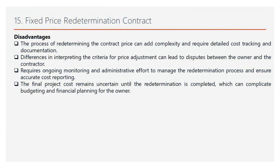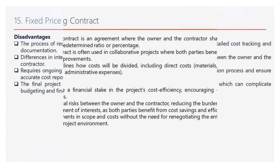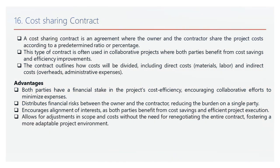Understanding these drawbacks can help you prepare better strategies for managing a fixed price redetermination contract. Let's now discuss the cost-sharing contract, an agreement designed to promote collaboration and shared responsibility in project execution. A cost-sharing contract is an agreement where the owner and the contractor share the project costs according to a predetermined ratio or percentage. The contract outlines how costs will be divided, including direct costs such as materials and labour, and indirect costs like overheads and administrative expenses.